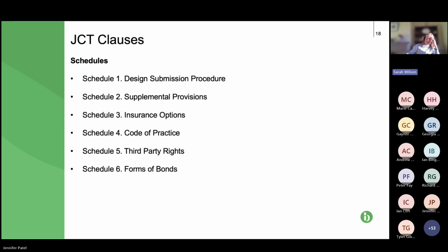And once it's accepted, it's binding on both parties, which means that neither party can then come back later on and say, actually, I want to pay less, or I want to recover more, which is along the lines of what we have with NEC, where the project manager and contractor can agree a quote, and that is set in stone between them. It's not set in stone as between the paying party and the contractor. So the paying party can still revert to adjudication at some point to get a final determination on it.